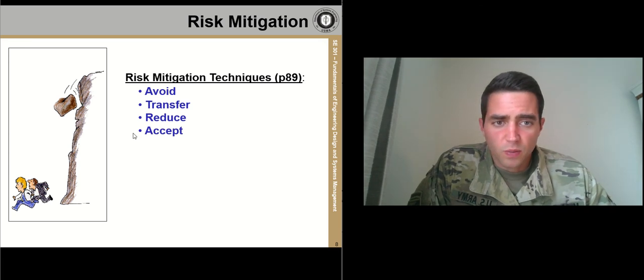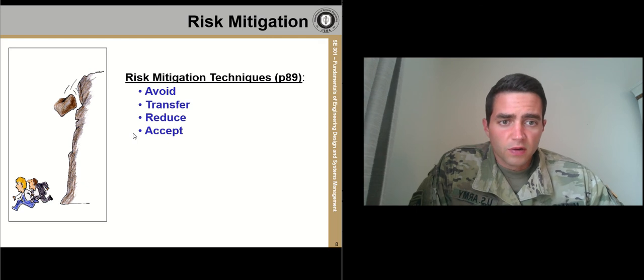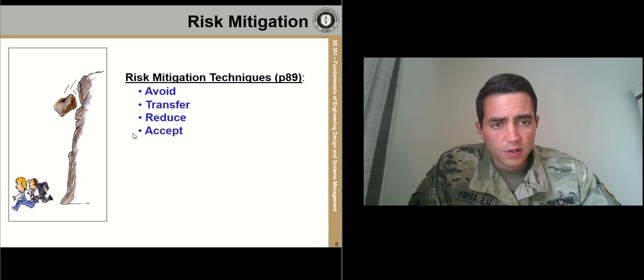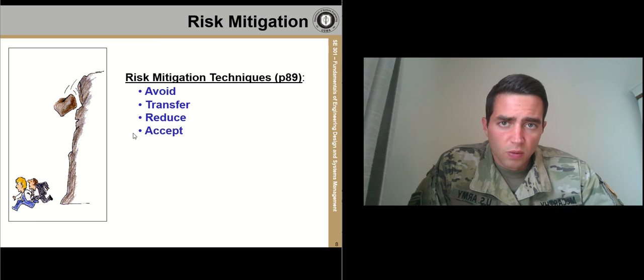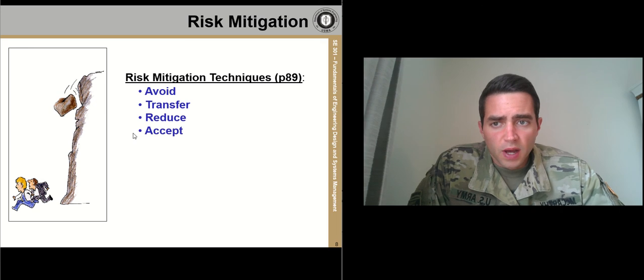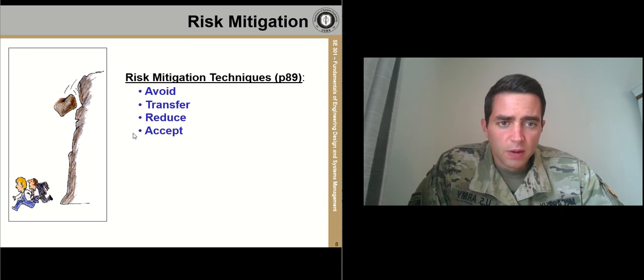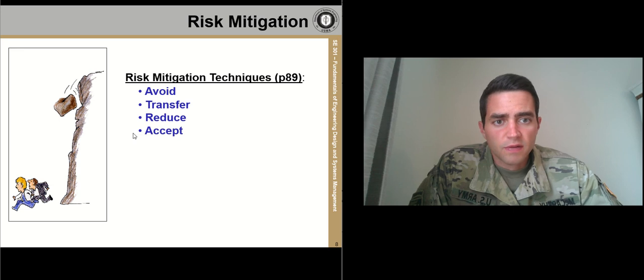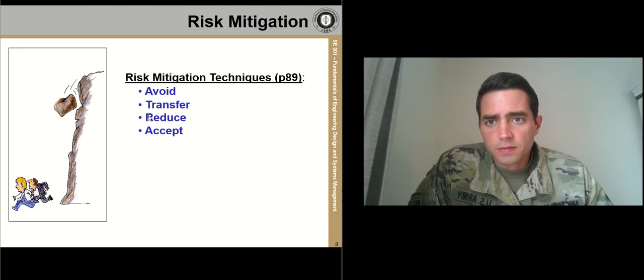It's important to understand all the risks that are involved as we continue in our decision-making phase of the SDP. In order for a stakeholder to make the best decision, we'll give them the numbers. We'll tell them the overall value based on our value model. We'll tell them the overall cost and how it compares to value, but those really shouldn't be considered in isolation. We should always inject a risk analysis, identifying what the risks are, and then telling the stakeholders how we can mitigate those risks so that they can actually achieve the value in their alternatives.